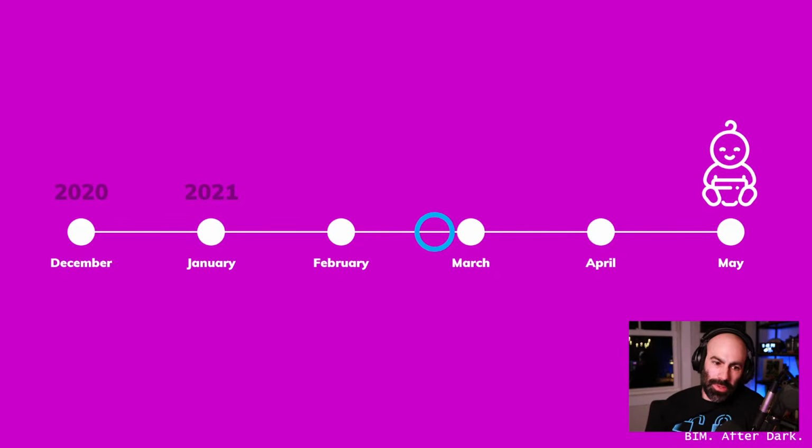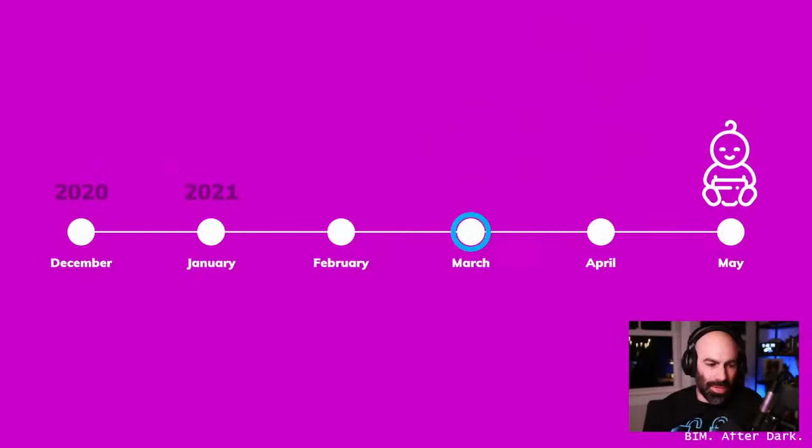February is done. So if you remember, I said 10 to 14 days, I think, for rough framing. Well, we started February 1st or 10th or something like that. We didn't finish till about February 28th. So basically the entire month of February was dedicated to rough carpentry, as opposed to 2 weeks. So that was obviously a tough one to swallow.